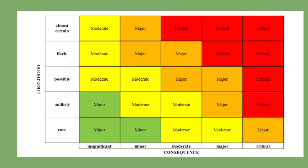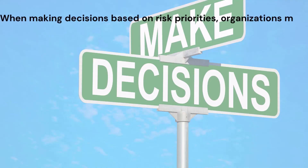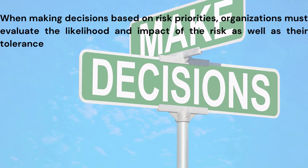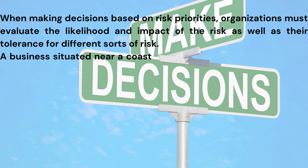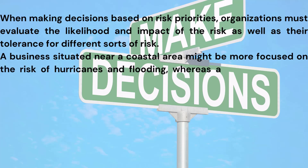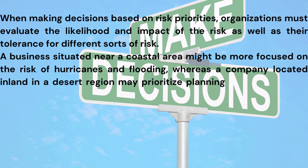A useful approach for ranking risks involves utilizing a risk matrix, where priority is determined by the intersection of the likelihood of occurrence and the impact. This matrix provides a shared language for communicating with management when establishing final priorities. For instance, a situation with both low likelihood and low impact might be categorized as low priority, whereas an incident with high likelihood and high impact would be designated as high priority. Organizations must also consider geographic-specific risks, such as hurricanes for coastal businesses or extreme heat for inland desert companies.